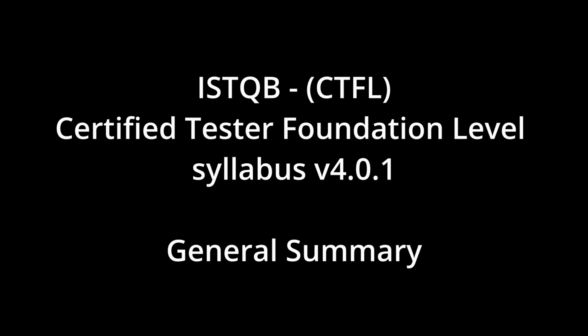How do testers specifically contribute to planning, especially in those faster-paced, iterative, or agile environments? It feels like planning might be different there. It is more continuous, but testers play a crucial role. In release planning, which looks ahead across multiple iterations, testers participate actively. They help refine user stories to make them testable. They contribute to defining clear acceptance criteria. They participate in risk analysis for the features planned in the release. They help estimate the overall test effort, determine the appropriate test approach, and plan high-level release testing activities like end-to-end or performance tests. And within each iteration?